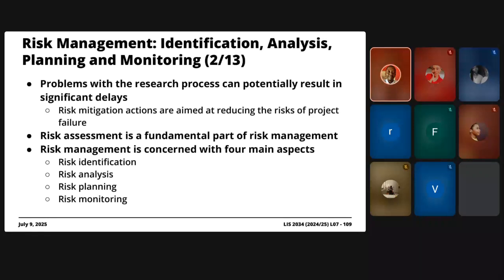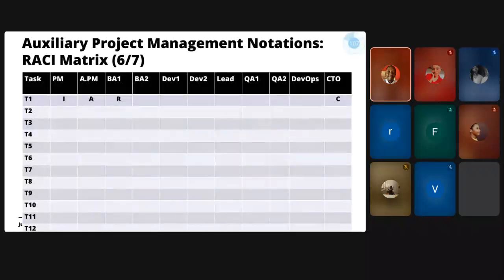And then in the third phase, I'm going to walk you through the phases so that you understand, you come up with a plan, right? So you come up with contingency plans. If one of us does leave, what can we do? Well, when we're assigning roles here, each task must have, at a bare minimum, at least 2 people attached to it. So that out of the 2, if one of them leaves, there will still be one person who is very knowledgeable about what was being done in the task itself.